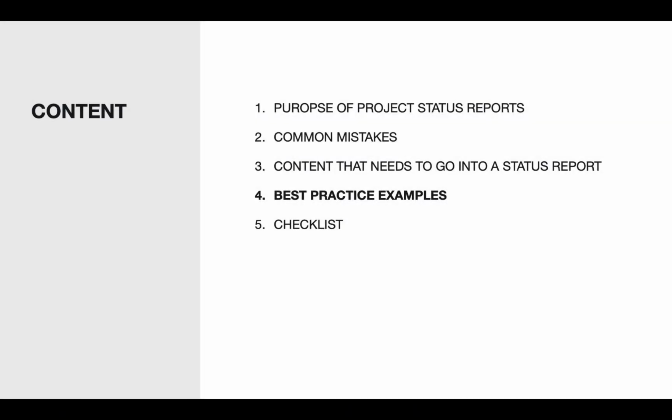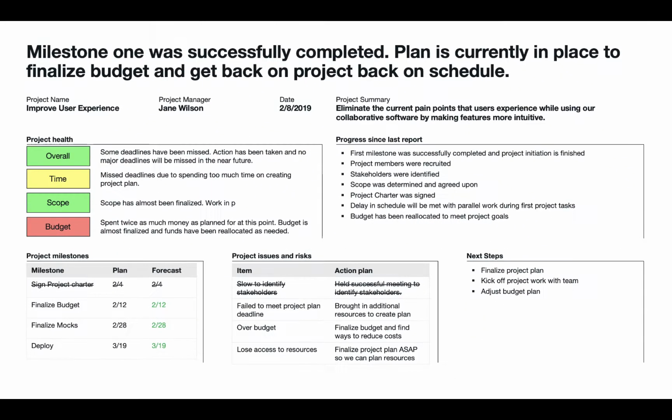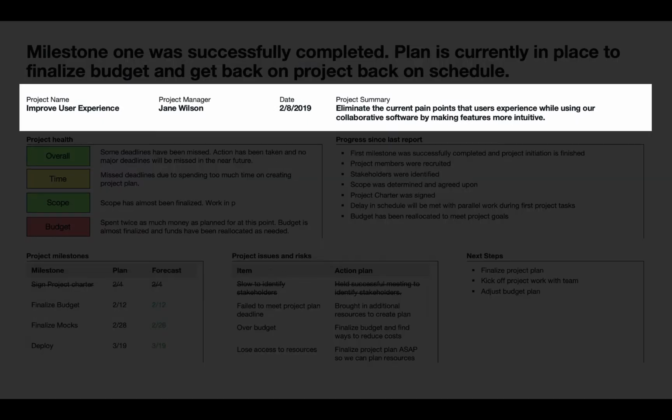Alright, let's take a look at two good examples on how to incorporate all necessary content into one report. This is the first example. Let me take you through it step by step. In the first row, there's all necessary metadata on the project. Its name, its project manager, a short summary on what the project is about, and the date the report has